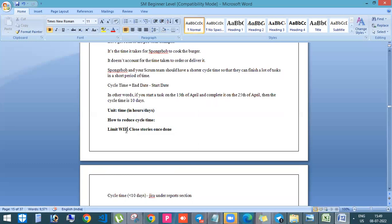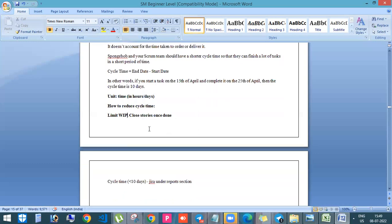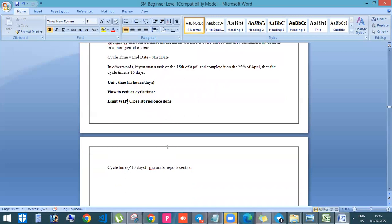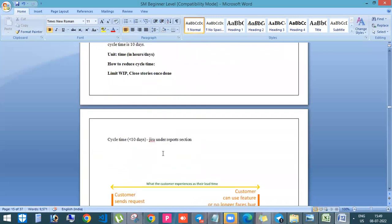We should have a limit. And then we should close the stories once it is done. That means daily we are inspecting the burn down chart. So we need to ensure that the stories are getting closed. Once it is done, we should not wait up to the end of the sprint. So this can help us to reduce the cycle time.